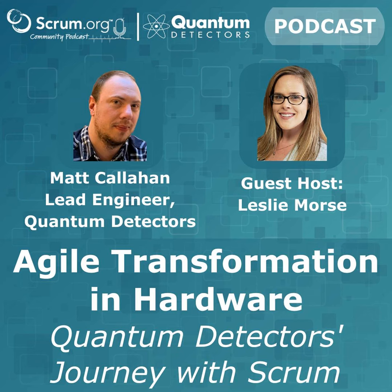I think the sooner that you can have the correct view of Scrum, the better, because if you've got an incorrect perception of things, then you might not ever even start the journey. So I would try and do that sooner. Some of the things that we've had wrong: getting the sprint length right, and making sure the right people are involved. We might have developed this great thing at the end of the sprint, and then we didn't tell anyone about it, so it's a bit wasteful. The customer didn't know it was there, or the stakeholders weren't informed of what was going on. So it was a wasted effort. We definitely had that type of experience in the early days.